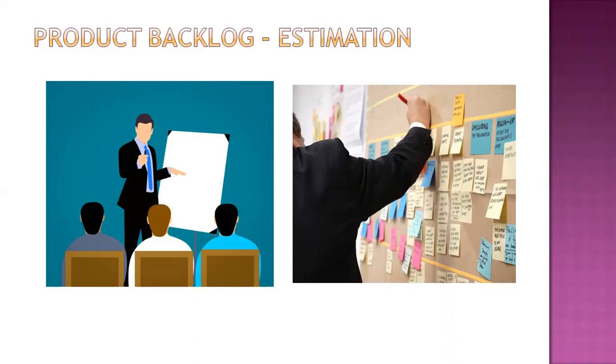Not only for forecasting the timeline, it also helps understand the priority. Even though search is a major functionality which holds high priority, the product owner is in a situation to explain to the business, hey, in search functionality, go with only basic search as a high priority, not the advanced search. Because advanced search is taking more time, I feel it can be taken as a back seat, and let's lower the priority. So for prioritizing things also, this estimation is going to help.